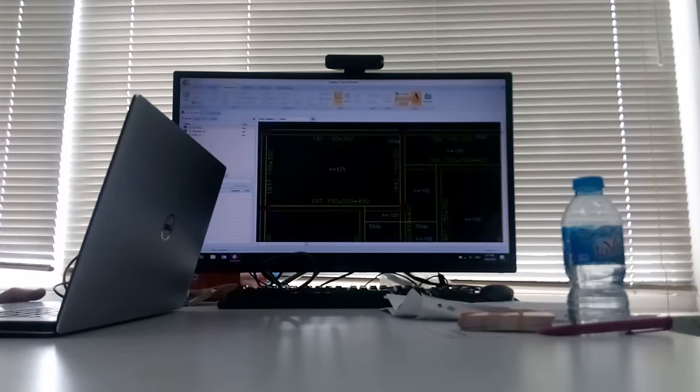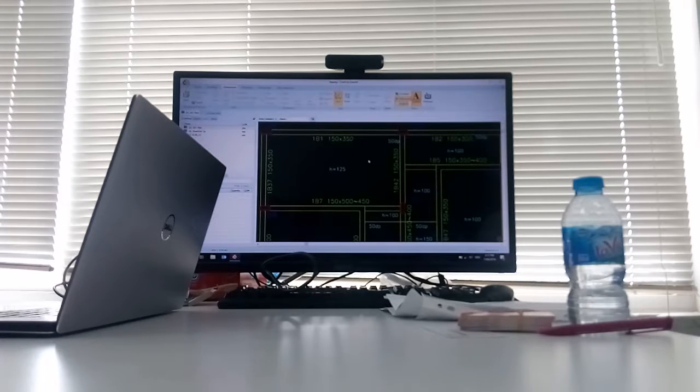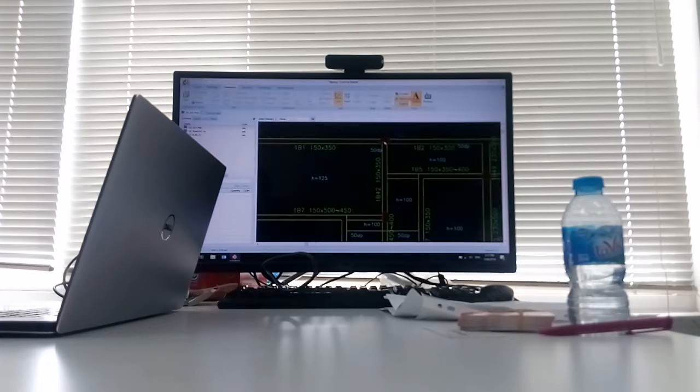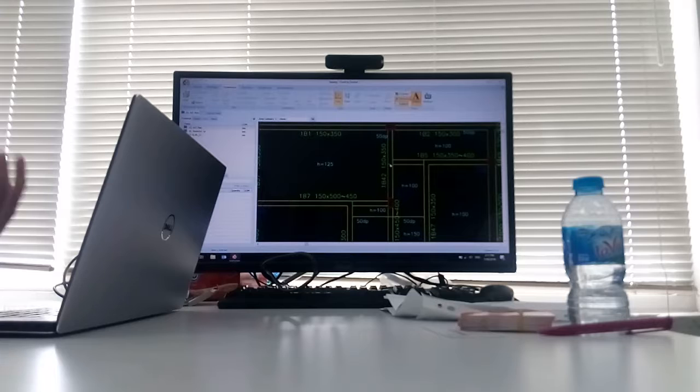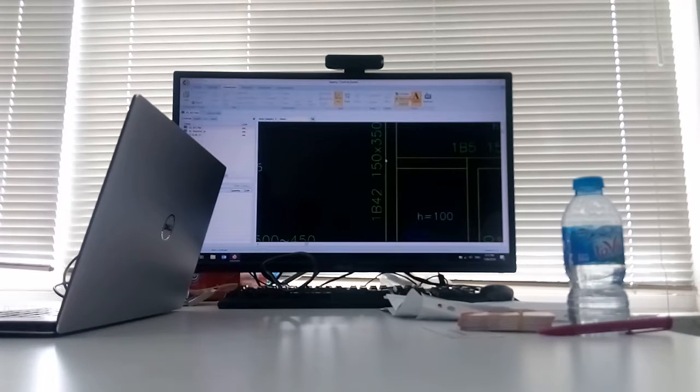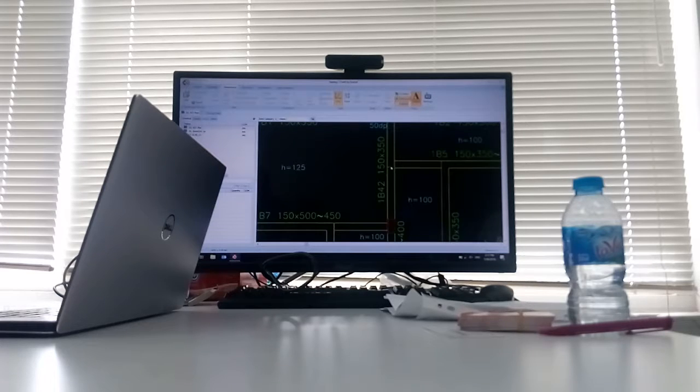Okay, so the first thing that I saw in the list is you mentioned the intersection within the beam. For the intersection of the beam, for example, this is the part where there is a column. I just take an example. This part they don't have any column. So the user who takes off must understand which beam the quantity inside this intersection belongs to. You are the one to decide when you do the measurement.